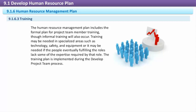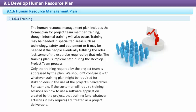The Human Resource Management Plan includes the formal plan for project team member training, though informal training will also occur. Training may be needed in specialized areas such as technology, safety, and equipment, or it may be needed if the people eventually fulfilling the roles lack some of the expertise required by that role. The training plan is implemented during the Develop Project Team process. Only the training required by the project team is addressed by the plan. We should not confuse it with whatever training plan might be required for stakeholders in the use of the project deliverables. For example, if the customer will require training sessions on how to use a software application created by the project, that training and whatever activities it may require are treated as a project deliverable.